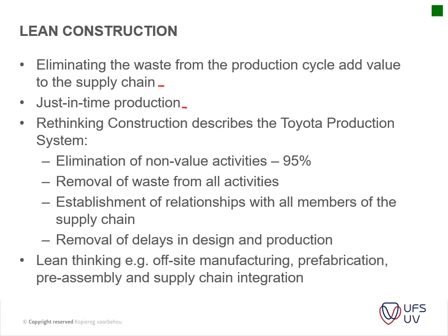Obviously, it's not always that practical, especially if you've got lead times from different suppliers and you do not know whether they're going to have enough stock within a month or two. It might be a challenge to order or to manage this. One way of overcoming this is to order material so that it sits in their storerooms and they only deliver it a day or two before the time. But another risk is whether you are on time to actually install the items.